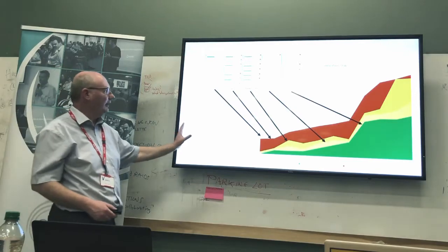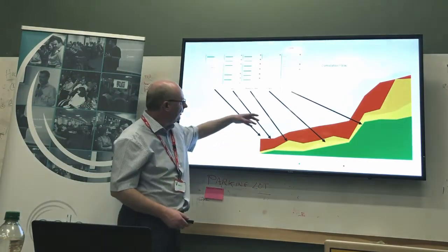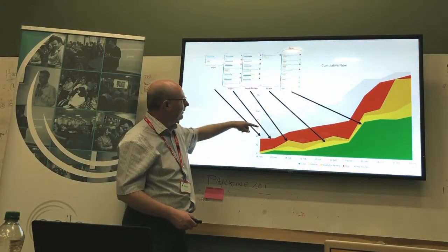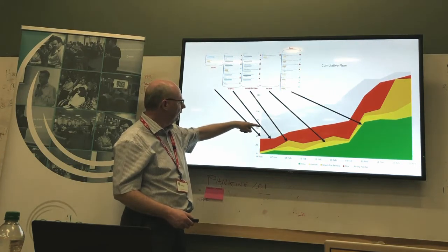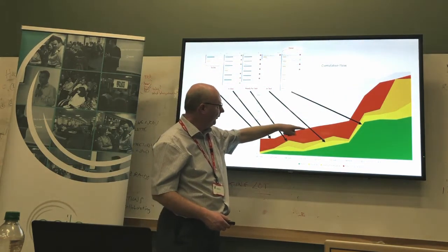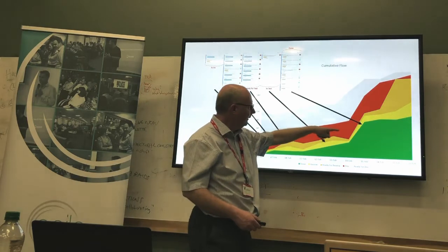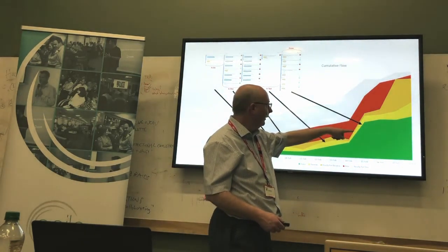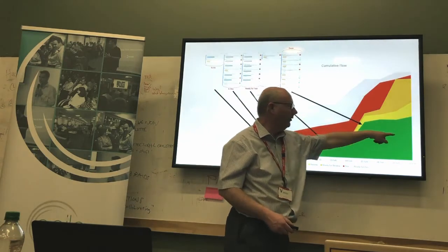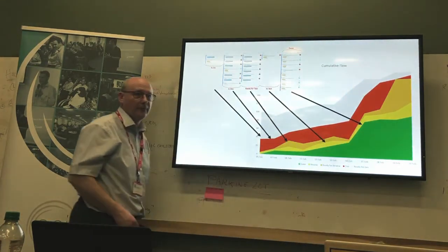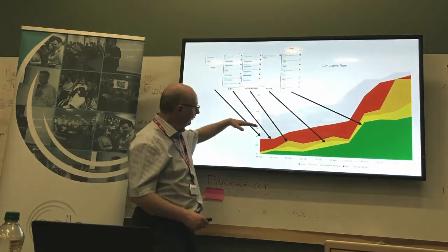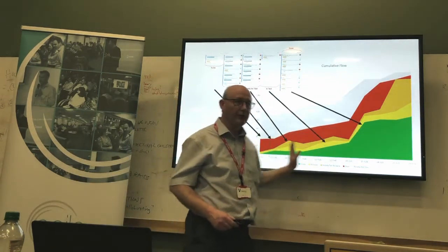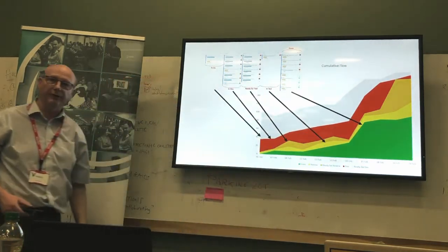Well, what this is showing you is stuff flowing from to do. Let's just take this point here. Stuff flows from to do, and as you go across at the same height, it gets into dev, and then it gets through test. Our testers are obviously pretty efficient here. They've got through it pretty quickly, and then it gets into done. So that's just taking a horizontal line across the chart. You can see stuff is flowing from one side of the board to the other.